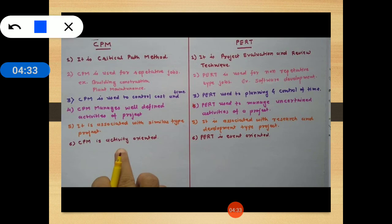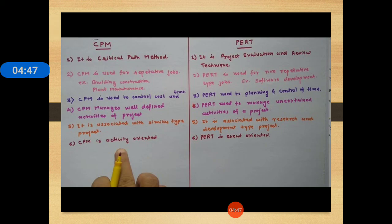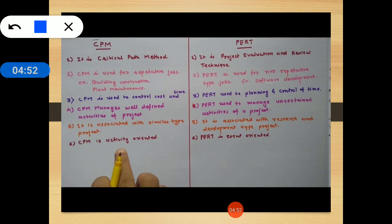To summarize the comparison: CPM stands for Critical Path Method and PERT for Project Evaluation and Review Technique. CPM is used for repetitive jobs. CPM is activity-oriented while PERT is event-oriented.